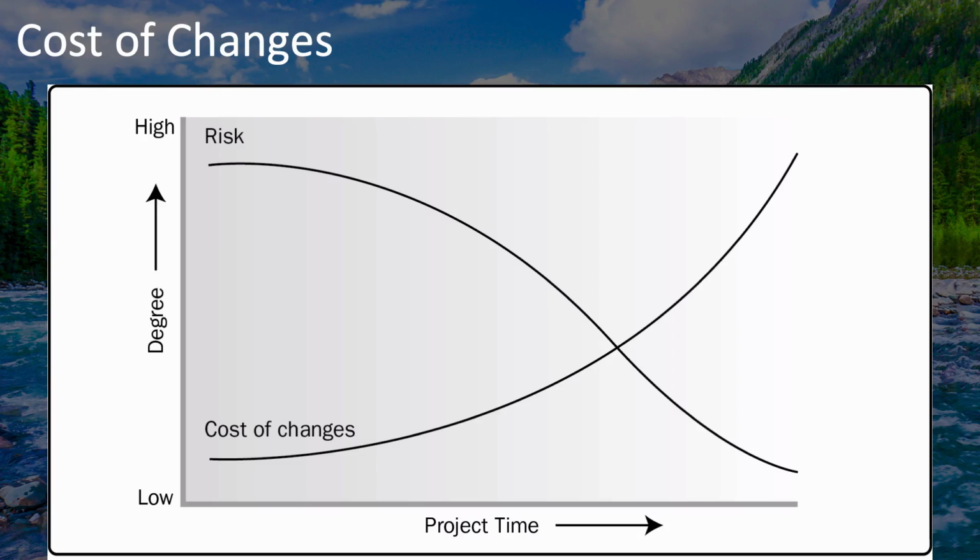But as you go through the planning processes, you identify those risks, come up with a proactive plan to manage those risks, and so those risks tend to go down as a result. The second reason is that as you progress through the work of the project, tasks that were risky are completed, and so those risks are no longer relevant.